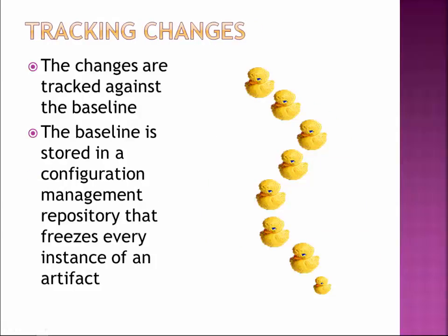And so when I make a change, I need to make a change against a baseline. And that baseline then is going to be updated, but I keep what the old baseline was. So I know when the requirement was you shall accommodate 8 users, this was how I defined the system I was going to build. When I change that requirement to say the system shall hold 8,000 users, well, these are the impacts of it. This is the new baseline I'm going to create, where instead of designing it for 8 users to be on an individual laptop, for 8,000 users, I'm going to have to create servers and figure out artifacts and things like that.